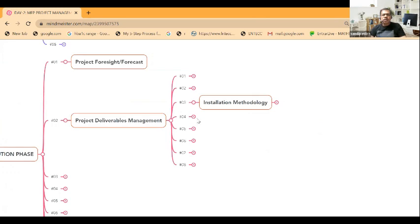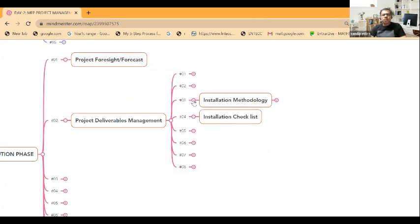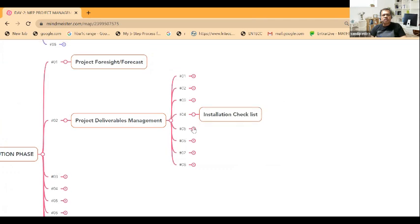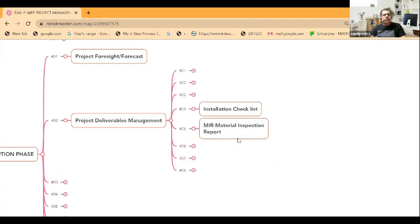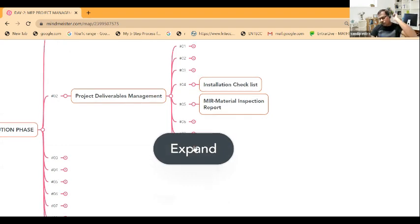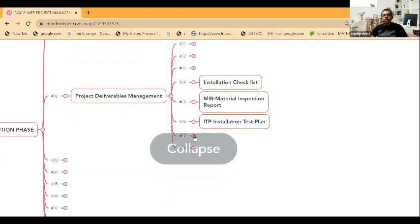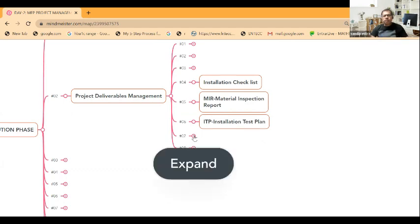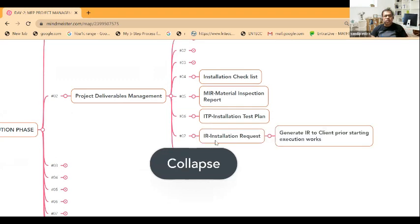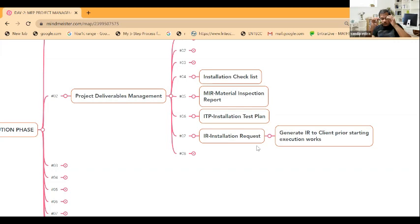Next part is the installation checklist. We have to follow the MIR - material inspection report. When material comes to the site, you have to go through the material inspection report. Both parties have to inspect the material whether that material was received based on approved documents or not, then it has to be verified. You will prepare the ITP - this is the documentation part. MIR, material inspection record is to be prepared, installation checklist has to be prepared, ITP installation test plan. IR - what is IR? Installation request, and that has to be taken care of.